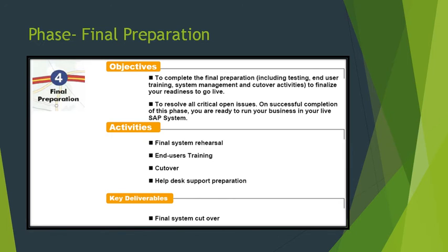The fourth step is final preparation. As phase 3 merges into phase 4, you find yourself not only in the midst of SAP tuning but also in the midst of rigorous functional and stress testing. The focus is on fine-tuning your configuration before go-live and, more importantly, the migration of data from your old system to SAP. Workload testing including peak volume, daily load, other forms of stress testing, and integration and functional testings are conducted to ensure the accuracy of your data and the stability of your SAP system.